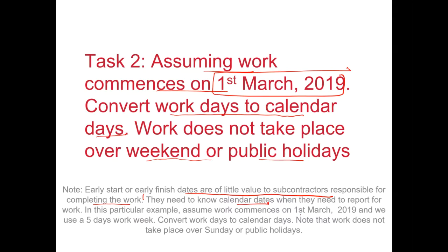So in this, your assumption is work is starting on 1st of March 2019, and we use a 5-day work week, so standard shift 9 to 5. Convert the work days to calendar days. Note that work does not take place over Sunday or public holidays. Okay, so you can use a sheet like this to convert work days into calendar days.